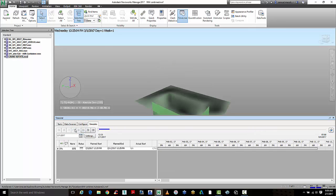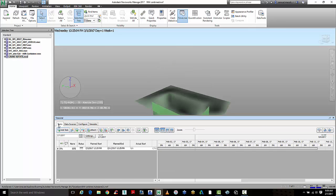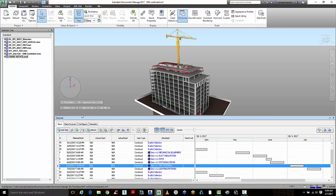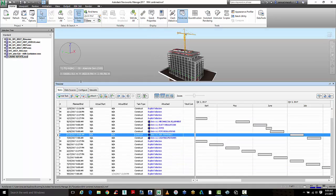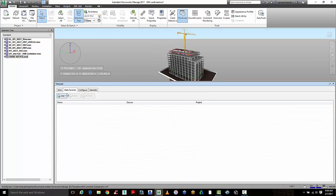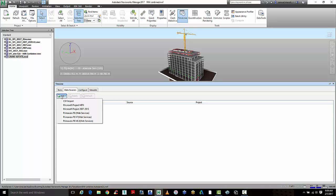So to do this, we can either write a construction program inside of Navisworks or we can import a data source from another construction Gantt chart program.